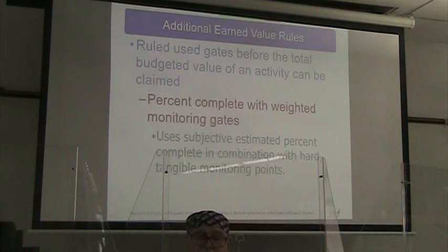Other earned value rules: we can use monitoring gates with earned value, so that at certain points, you have earned X percentage of this work package's earned value.